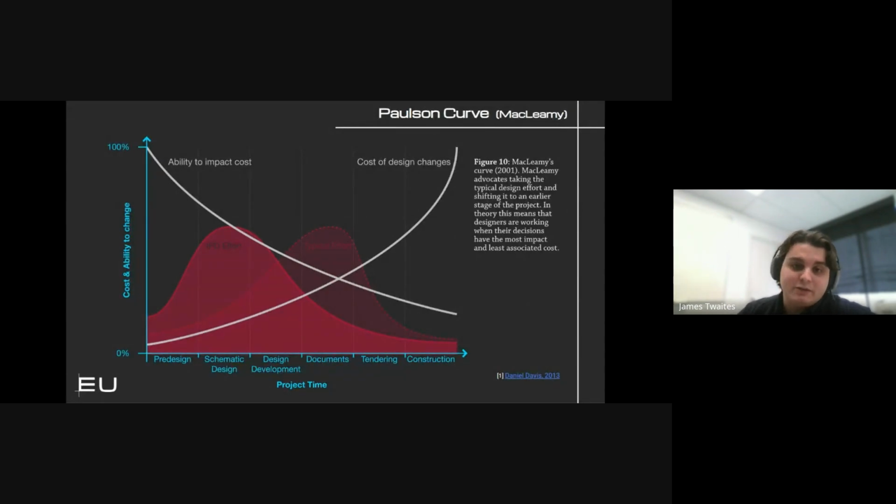It means you're paying restocking fees, you're recoordinating systems around the change. If it's already on site, you're double handling. Maybe you're taking down a ceiling that was already installed. I don't need to tell any of you that rework is expensive. That's not news to anyone here. But that's a case of a sort of a known unknown. Equipment selection and procurement is a known risk to budget and schedule, and that's why we have experts like Ben Brower here in-house with the experience to anticipate and to manage risks.